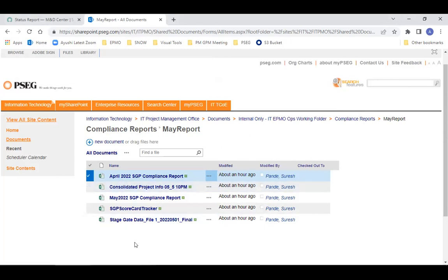Essentially, there are two files, the P6 file and the portfolio file. Both are linked on the project ID, and you need to basically change the format of the data, transform or transpose the data of P6 from rows to columns, then do a lot of data cleanup, and whatever predefined formulas are there, you can use that. That's it. It will take one iteration for you.